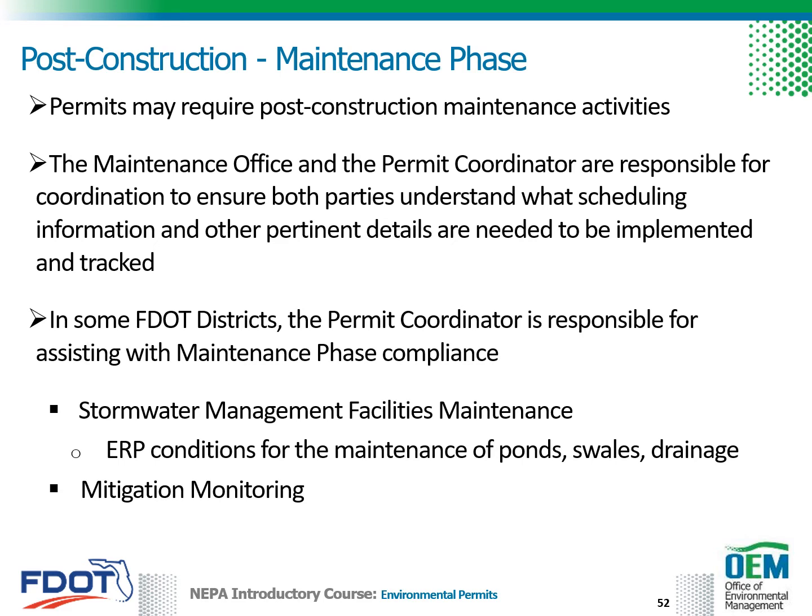Many permits require that post-construction maintenance activities be conducted. If this is required, it will be documented in the project-specific conditions within the permit. Examples of activities that may be conditioned for project maintenance are stormwater management facilities, such as ponds, swales, drainage structures, and monitoring of mitigation sites.